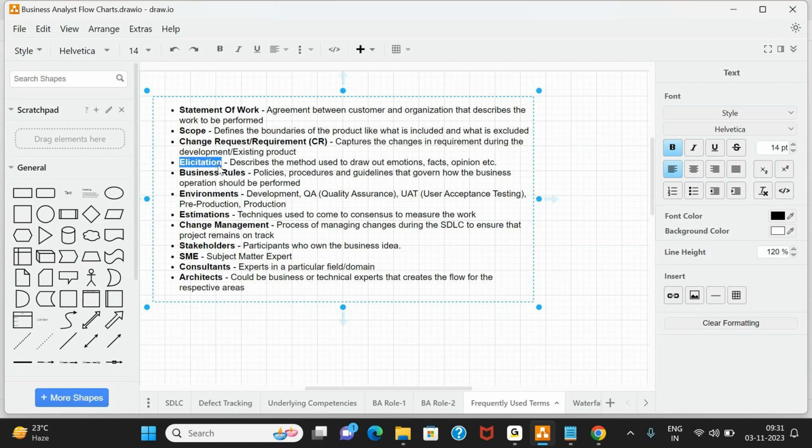Then you may not have to ask the customer for creating a change request. You can simply start updating your requirement document, your technical designs, and make the required changes. But if you all agree that it's a big change and that change will cost us a good amount of time, then you want the customer to create a change request irrespective of the stage you are in.